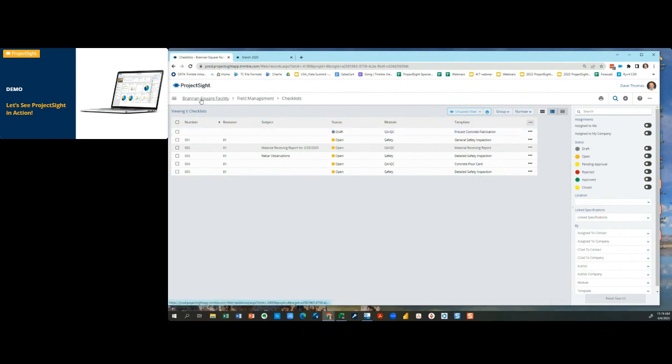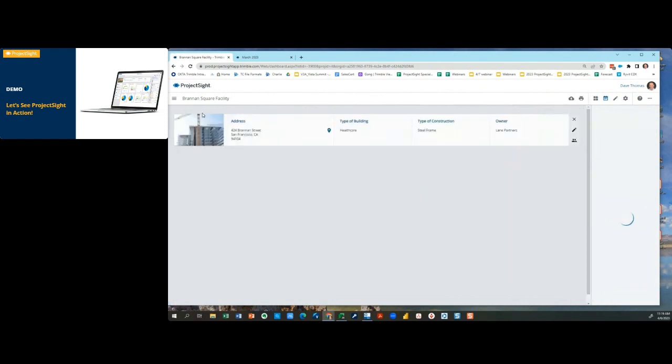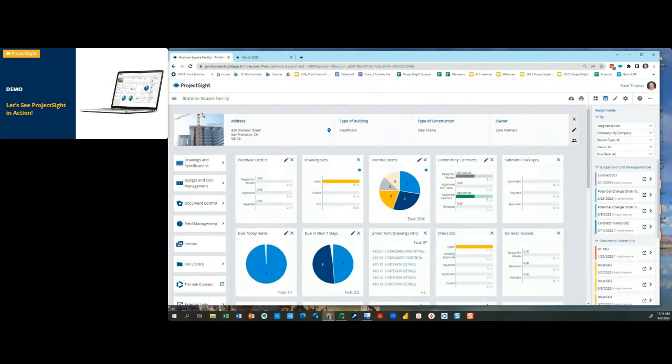Jump back into my dashboard here. All right, so we talked about change orders, tracking really early stage change. You could do that in issues as well, like that one change order, that PCO4 I pulled up on the screen, originated as an issue, became an RFI, tie that into a PCO once it becomes a PCO, and that PCO is going to probably become an approved change order down the road. Flows into accounting, easy peasy, nothing lost along the way, right?